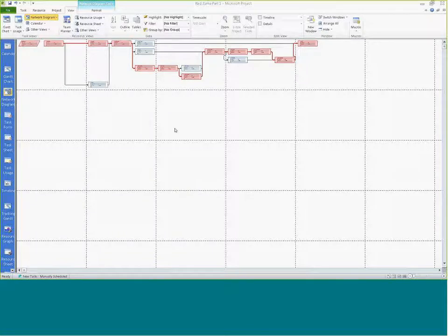We could look at this starting from the front of our project. Design selection could be sensitive. It is a merge activity, and it's also feeding three other activities. We could also look at final product design.